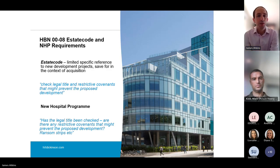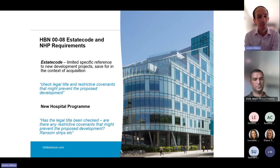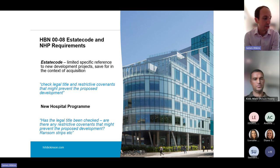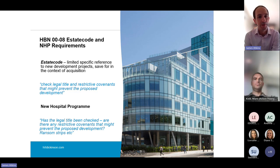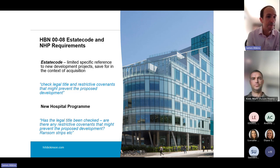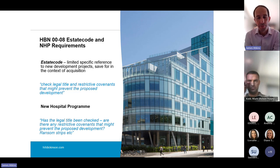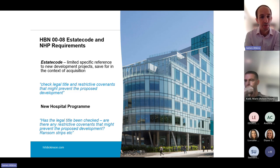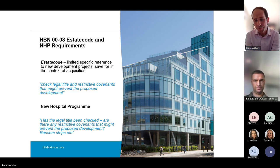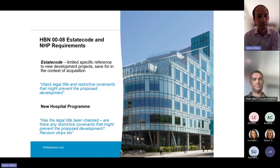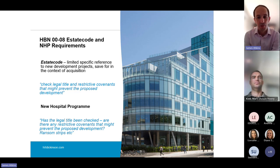Looking at the comments in the estate code and new hospital programme about title due diligence: the estate code deals with it very briefly. In the context of acquisitions, it says there should be a check on the legal title and restrictive covenants that might prevent the proposed development. The new hospital programme checklist asks whether legal title has been checked and whether there are any restrictive covenants that might prevent the proposed development — mentioning ransom strips, etc. But it's important for trusts to understand it's not just restrictive covenants that might inform what you can do on a particular site.